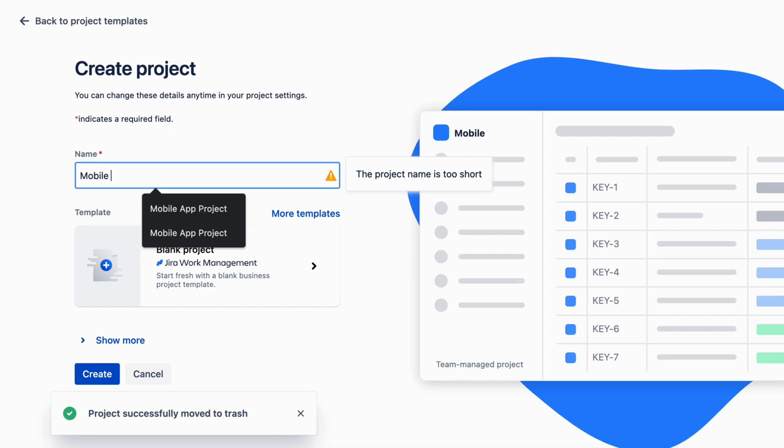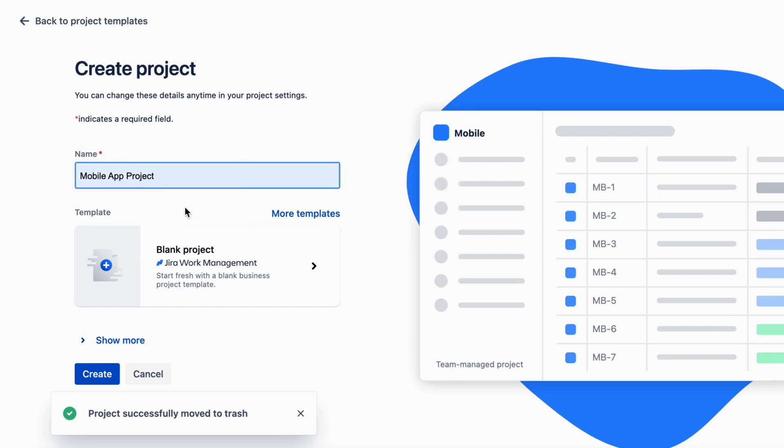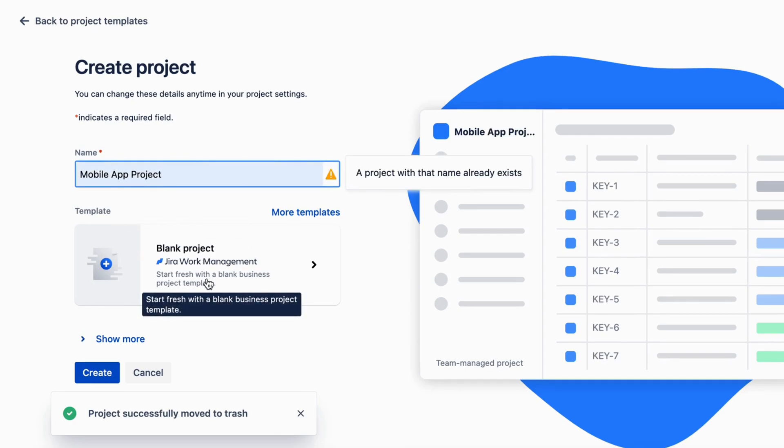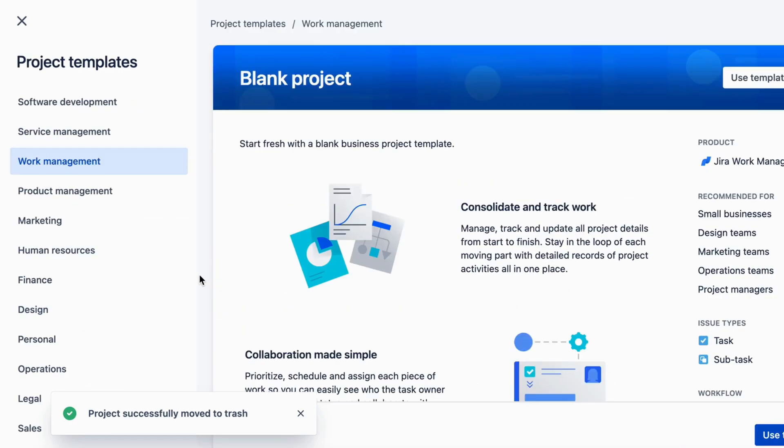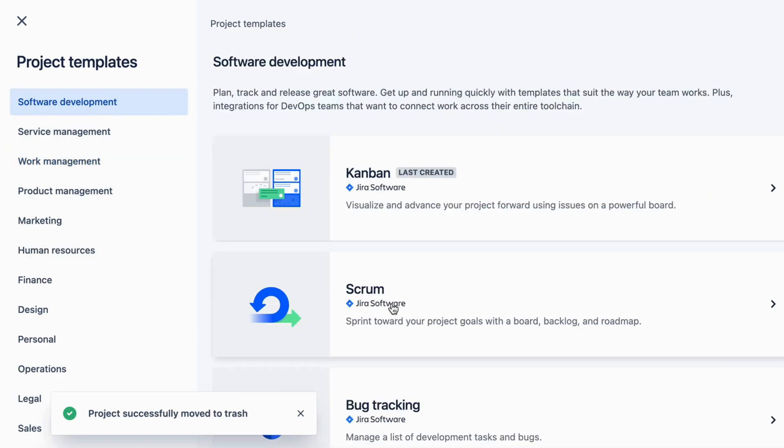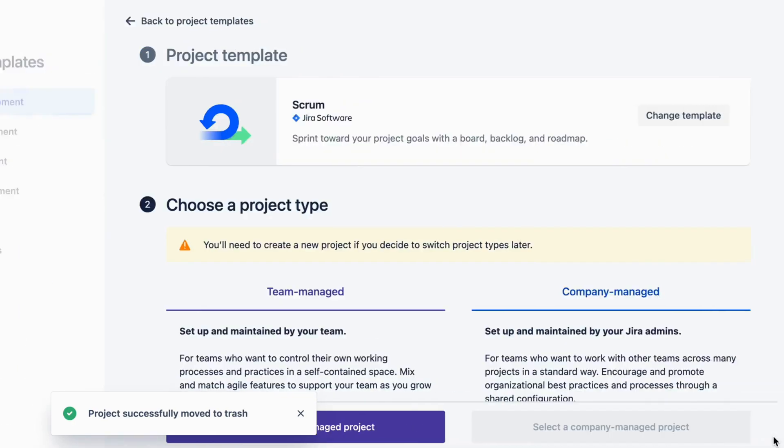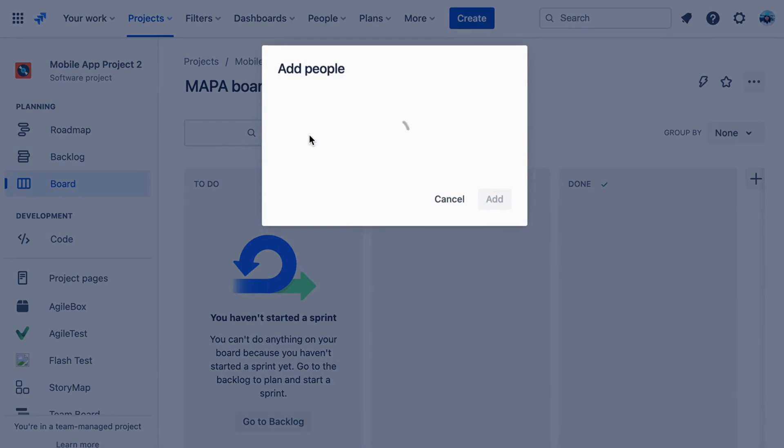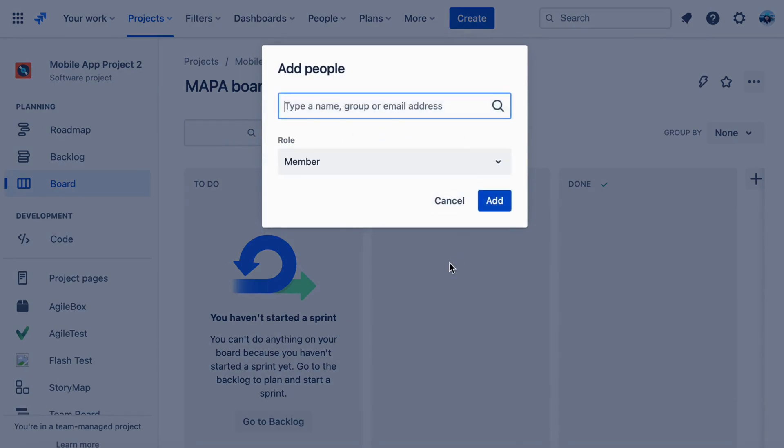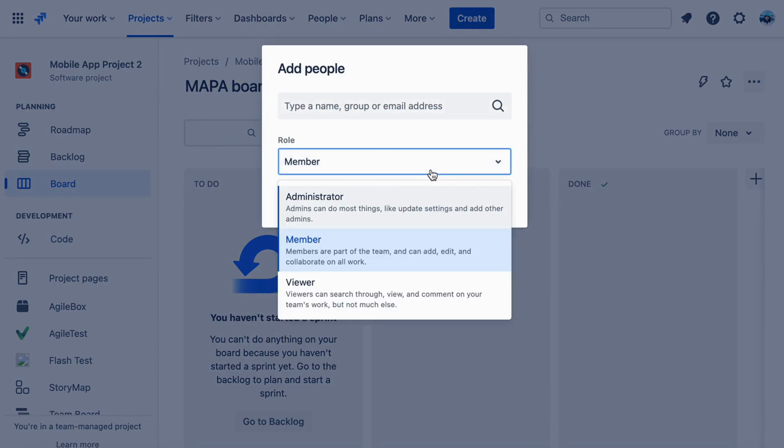First, create a new project in JIRA for your mobile app development team. Create a new board, selecting the Scrum board type. Add your team members to the board, assigning them appropriate roles and permissions.